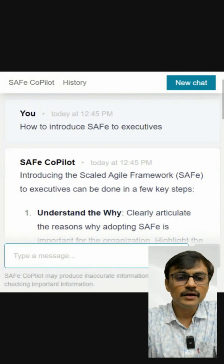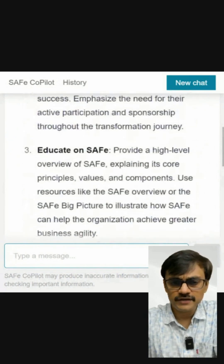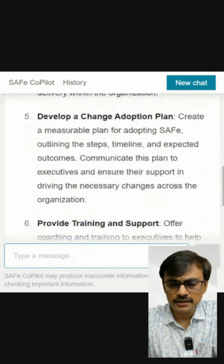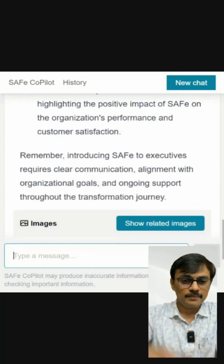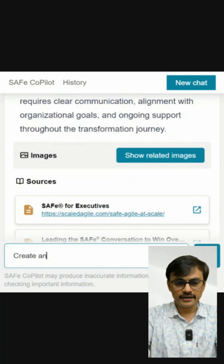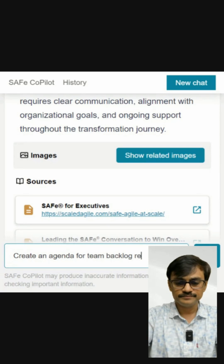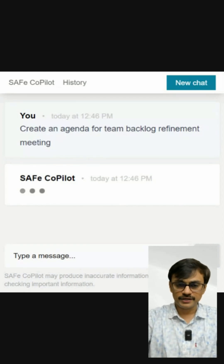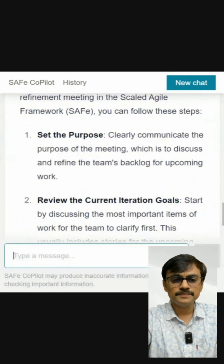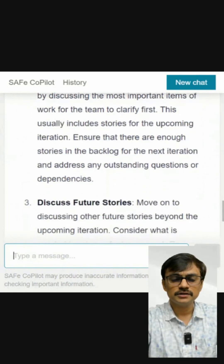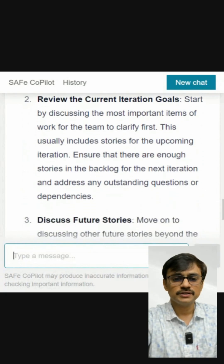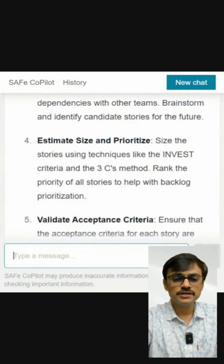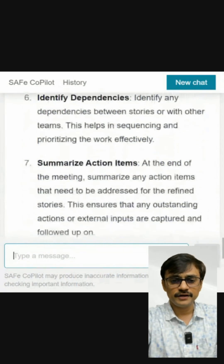It focuses on that because I used the word 'introduce.' If I say 'how to explain SAFe to Executives,' it may give different answers. It gives a decent answer on how to approach introducing SAFe to executives. Now let me ask: create an agenda for a team backlog refinement session. The response covers: set the purpose, review current iteration goals, discuss the most important items, clarify work items, ensure enough stories in the backlog for the next iteration, discuss future stories, estimate size and priorities, validate acceptance criteria, identify dependencies, and summarize action items.